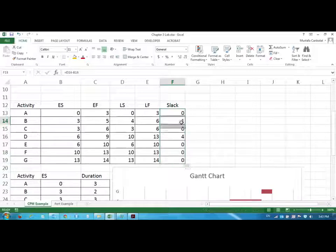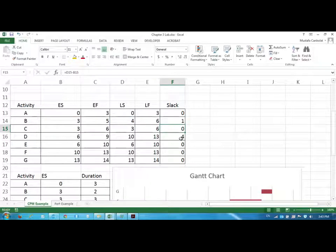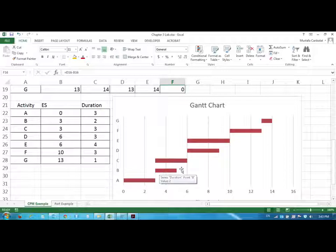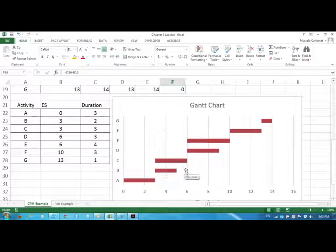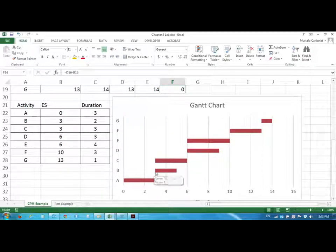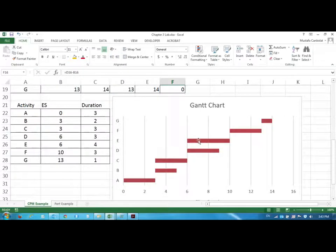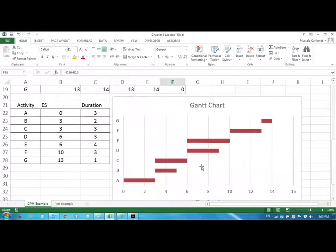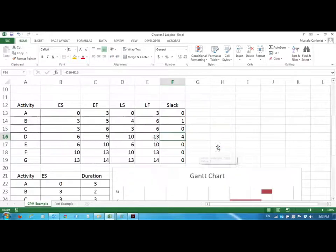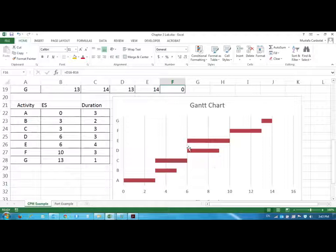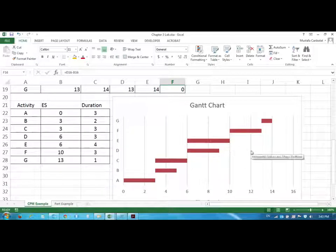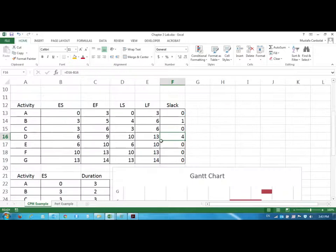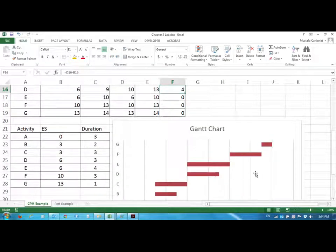And I see that I have for B and D I have some kind of a slack. Let me just look at here. B, I can delay B a little later and it's not going to affect the D and E. So there's some flexibility of either making the duration longer or just moving the start time a little further away. And if I look at D, D can just go up to 10 from 6. It's not going to delay any of the activities because the follower of D is just G. D has that much of flexibility here.